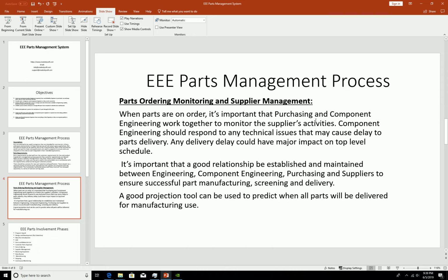You discuss with them because you want to make sure that 3 months from now, when you receive those parts, you put them in your units and there is no issue. Because if there is an issue, you need another 6 months to requalify a new part.